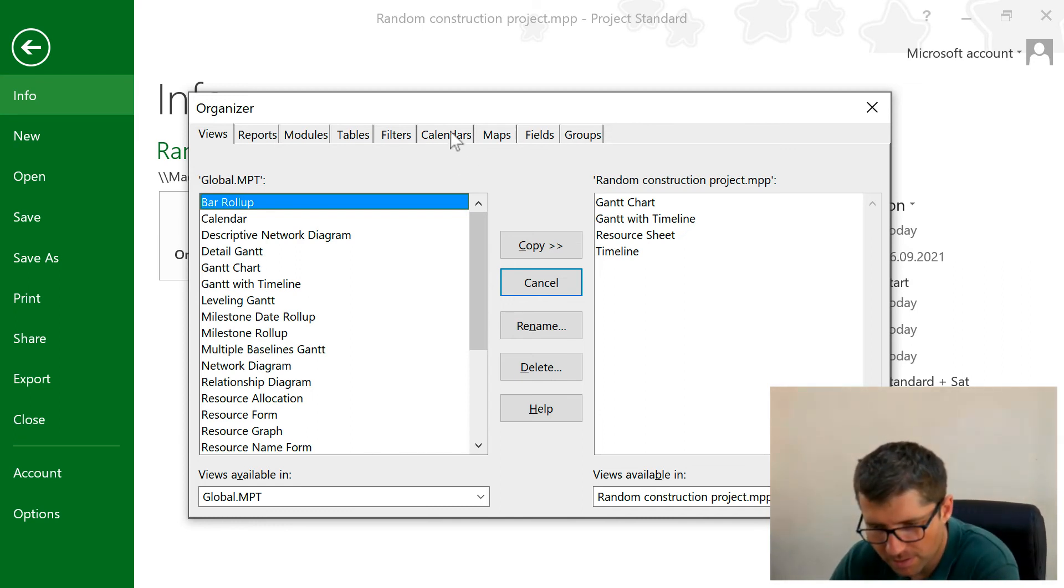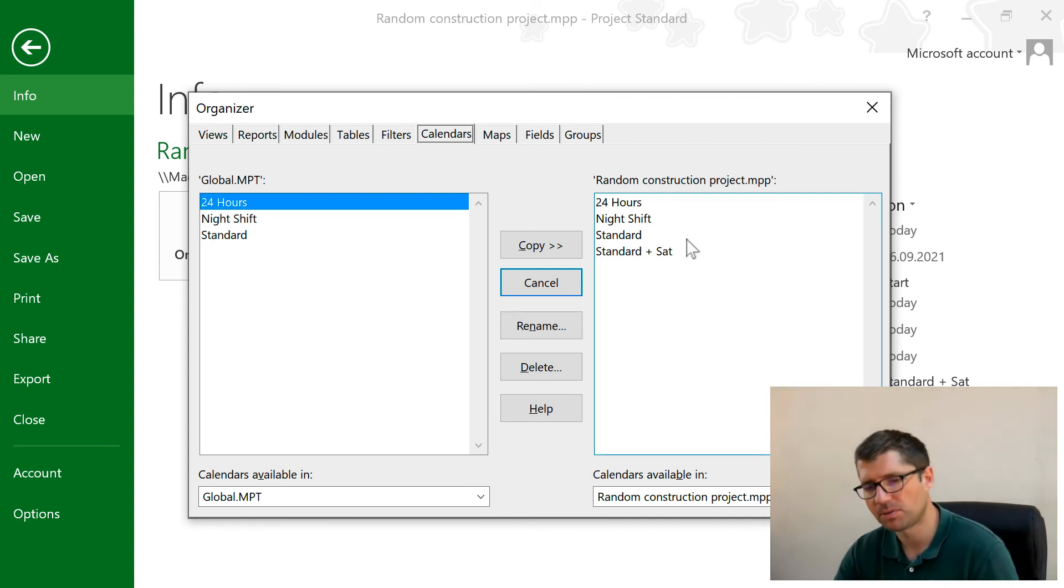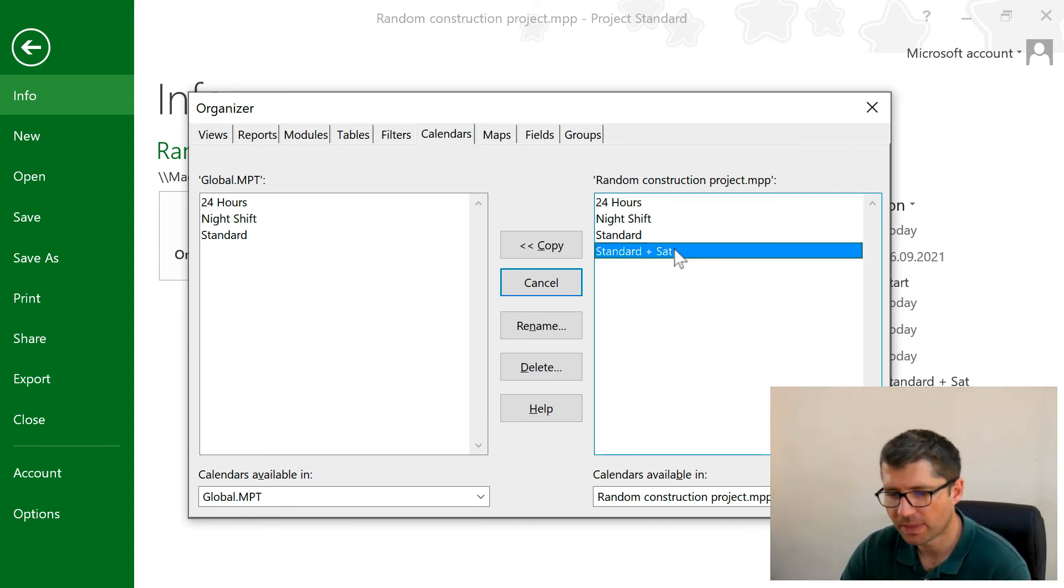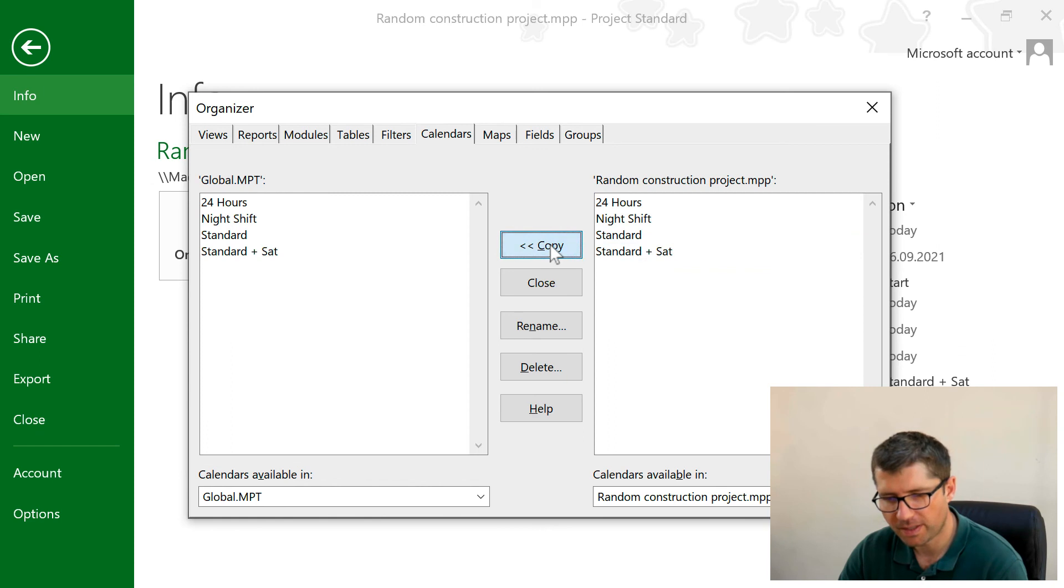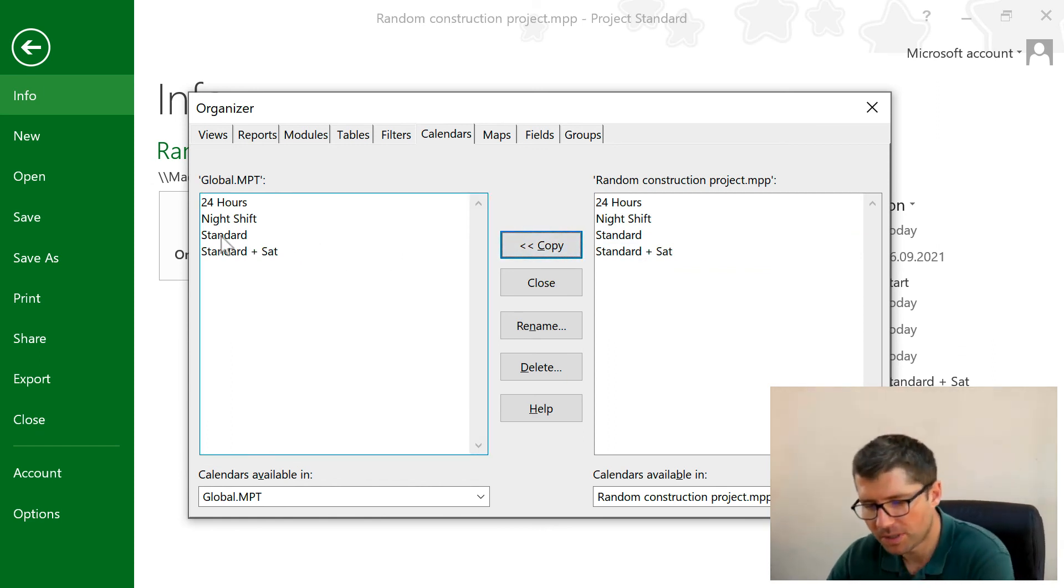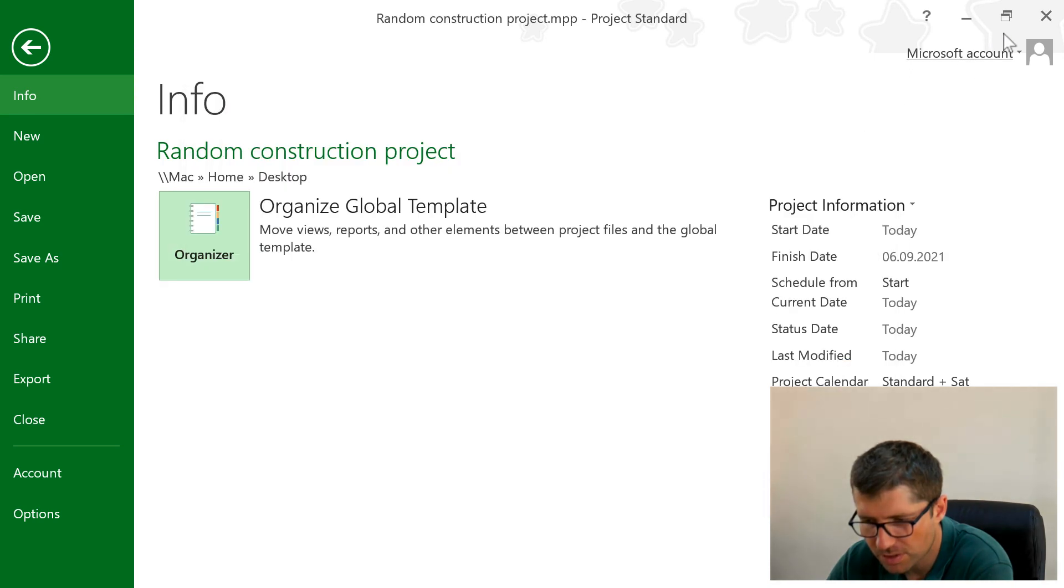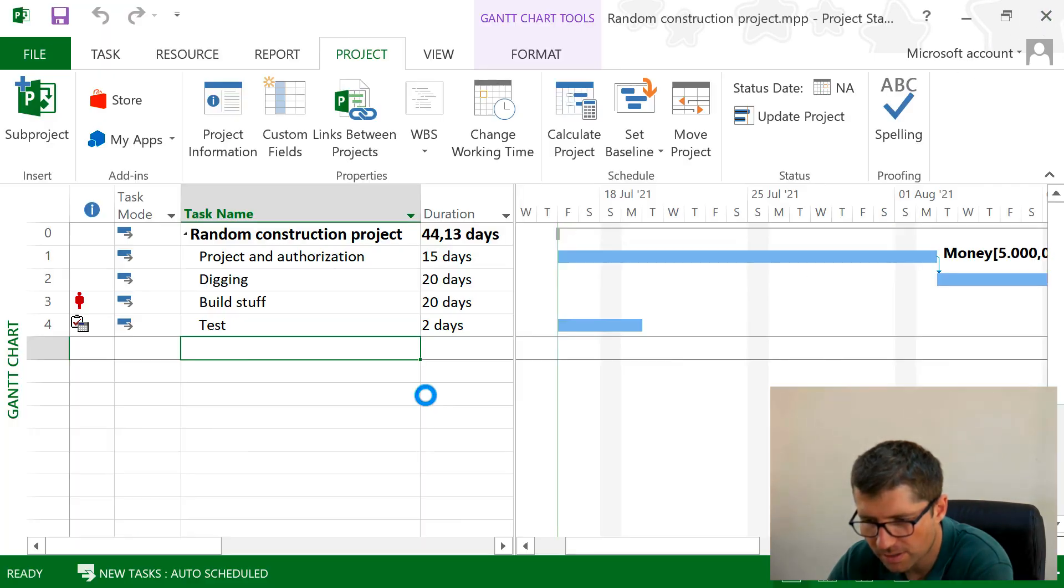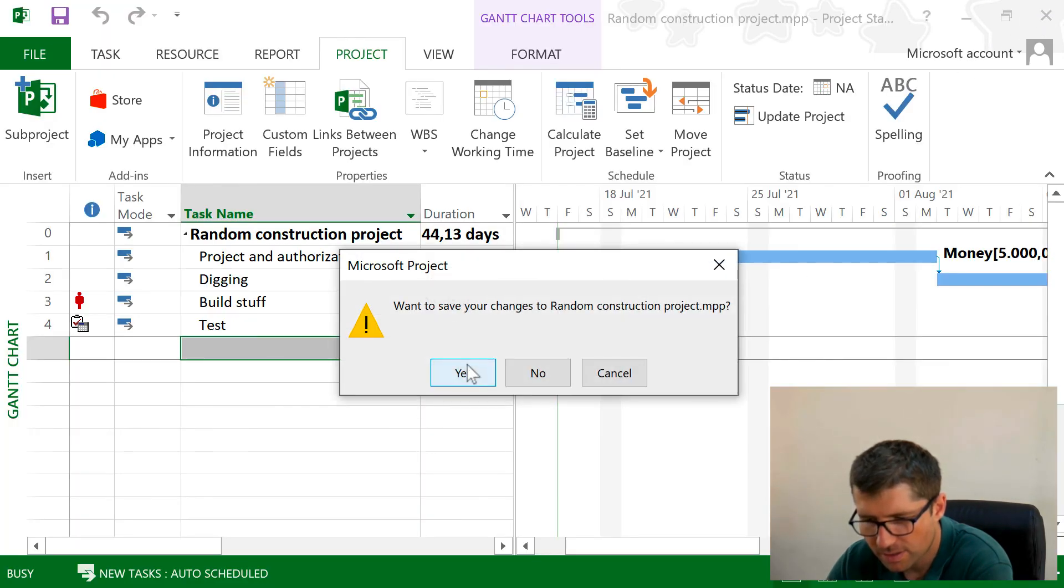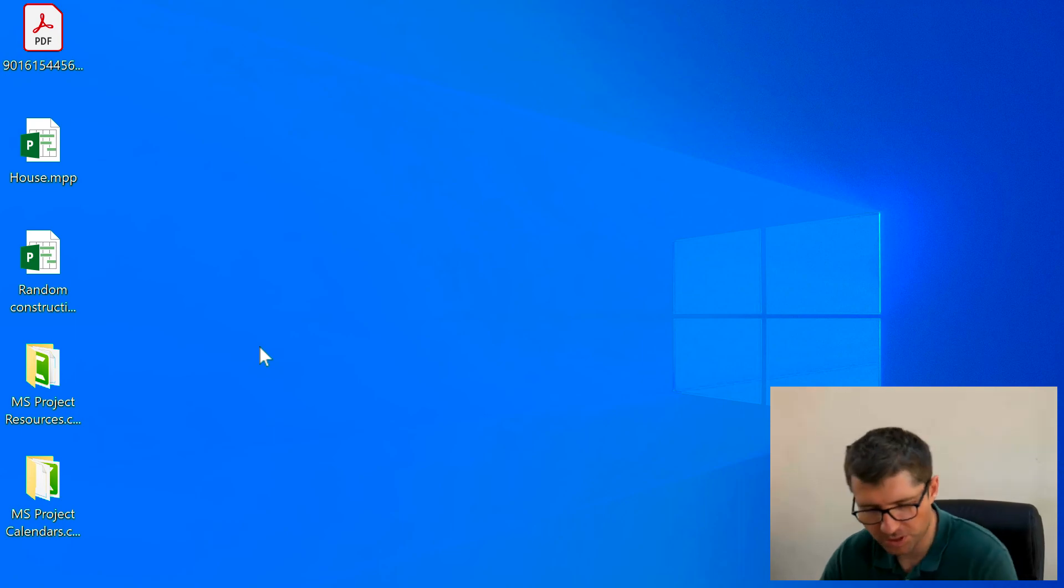I have here multiple things that I can copy to the global template, but I'm looking at calendars right now. For example, what I want to do is to copy this one into the global MPT. If I copy this, I'm gonna close it and also save it, and then I'm gonna open Project again.